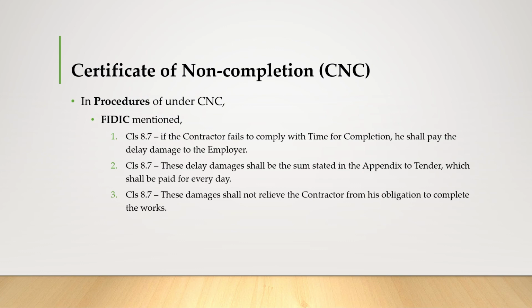So in FIDIC, the procedures under CNC is stated in clause 8.7. If the contractor fails to comply with time of completion, he shall pay the delay damage to the employer. This delay damage shall be the sum stated in the appendix to the tender, which shall be paid for every day. This damage shall not relieve the contractor from his obligation to complete the works.